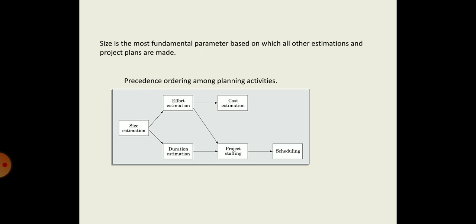Depending on the size of the project, the effort needed for the completion of the software will be estimated, and of course from the effort needed for the completion of the software, the cost is estimated. And the duration estimation also depends on the size of the project.